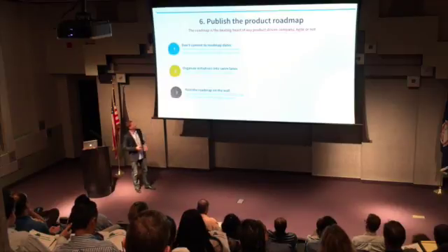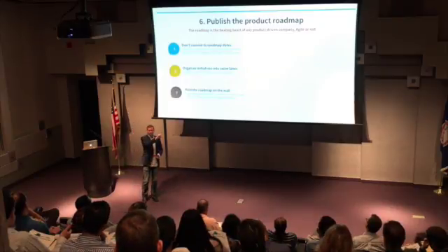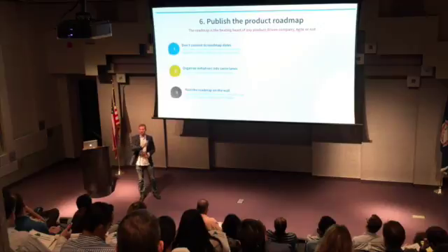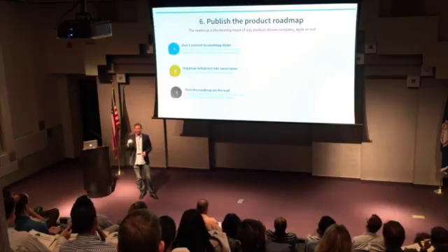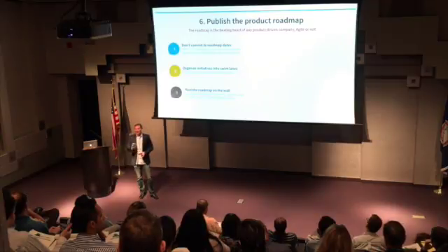So don't commit to dates. Organize the initiatives into swim lanes. I think it's really nice to be able to know, in order to close this gap, we are working on these things. In order to close this gap, we are working on these things, and so on. Because that's what allows every engineer ultimately to say... I love the idea that the CEO can come to an engineer and say, tell me what you're working on right now and tell me why you're working on it. And they can actually trace the whole thing.